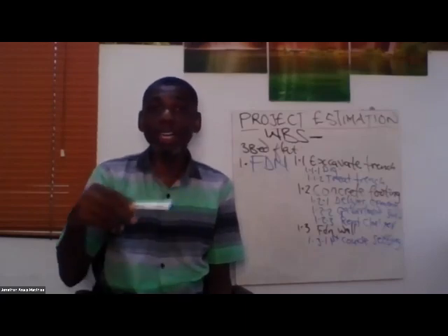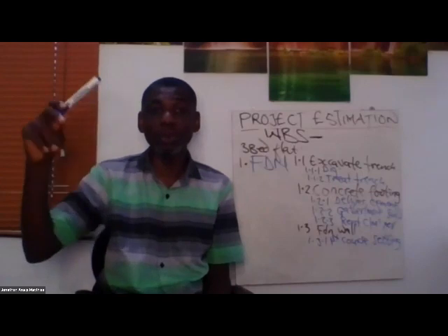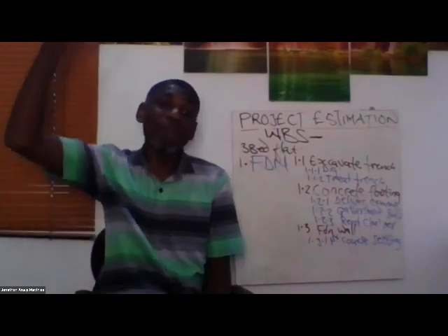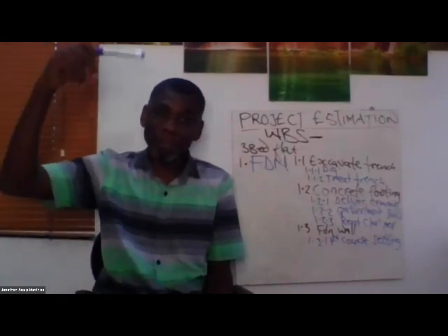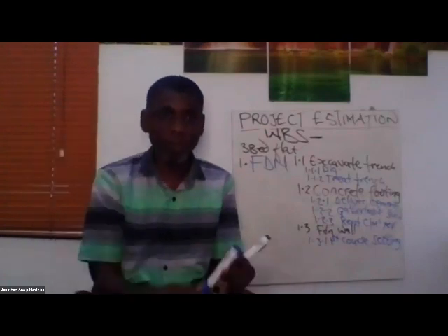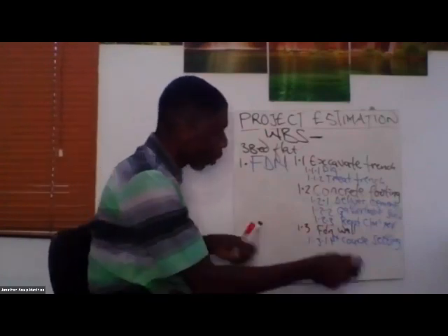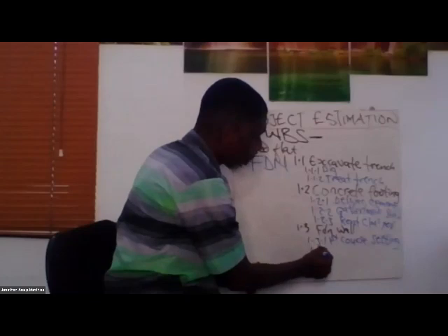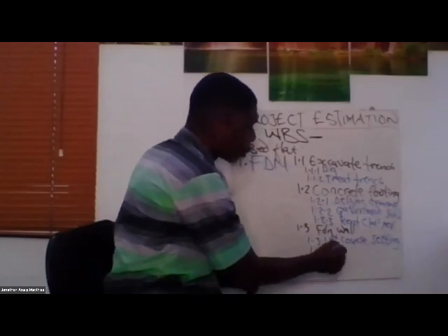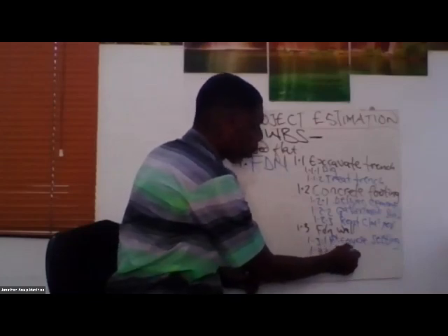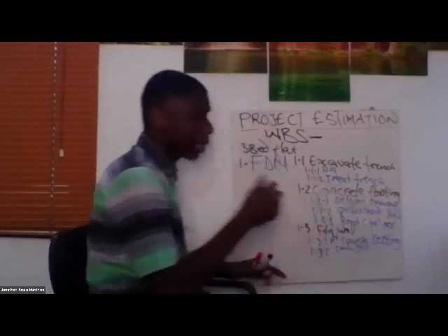Another time you need to increase your estimate is when you get to the top, when they need to start climbing up to lay block. It affects both your timing and your cost. So you may want to do 1.3.1, and 1.3.2, which is maybe second to third course. You estimate the time separately.